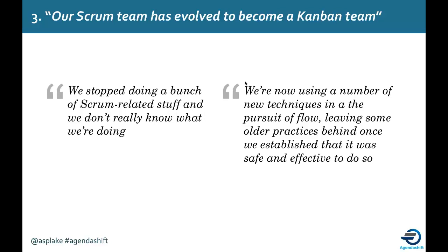We're really pursuing flow. We're pursuing things like continuous delivery, where we're delivering not just once a sprint, but multiple times a week, multiple times a day even. And that's fine. I would say that continuous delivery and Scrum aren't mutually exclusive. You can do time boxing in terms of what you plan to achieve over a sprint, and still make deliveries during that sprint. I'll go a bit more into how much we plan to a sprint and what our aims for the sprint is in a minute. And I think to understand those properly is essential to understanding what Scrum is really all about.